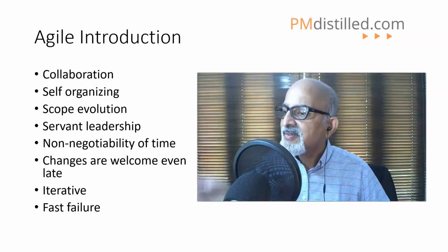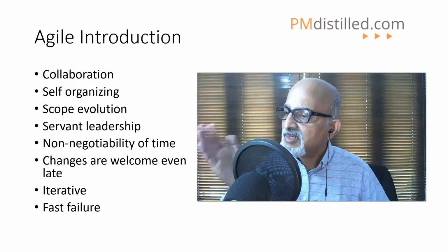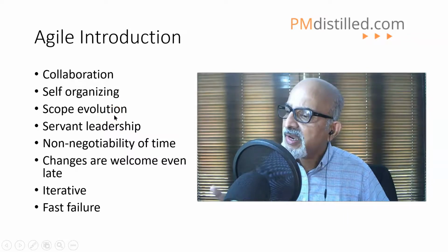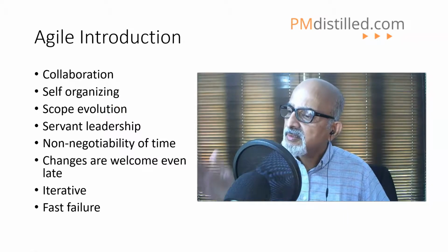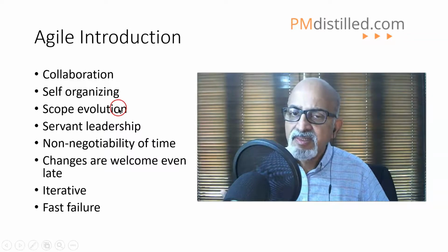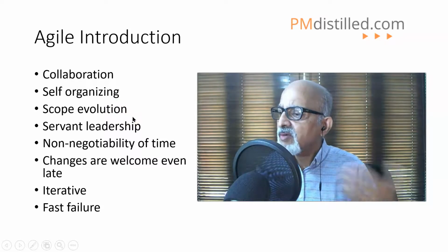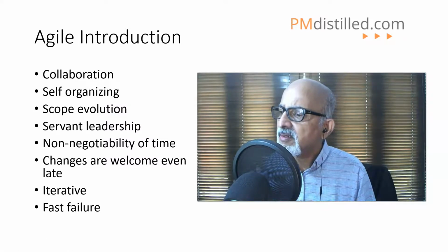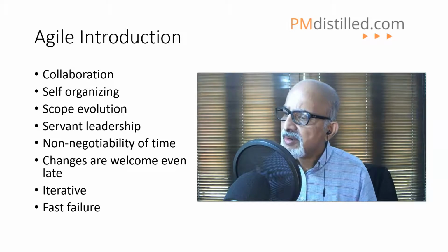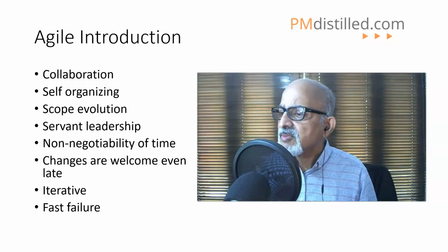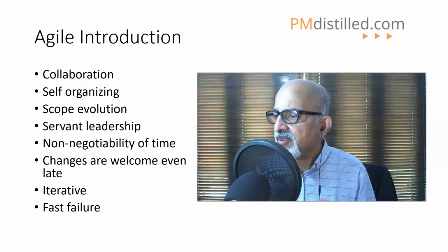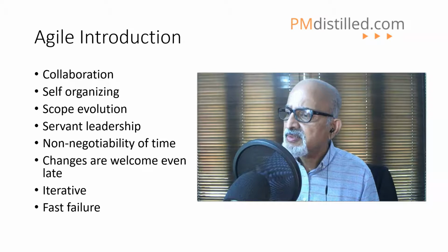It is just a master repository or master list of MDL. Master document list is prepared. So in Agile, similarly, we have a product backlog. The set of things that need to be done, that is the product backlog, which is allowed to grow as the project progresses. Similarly, this MDL, the master document list, is also allowed to grow. So that is the fertile space within a predictive project management where Agile methodologies can be adopted.